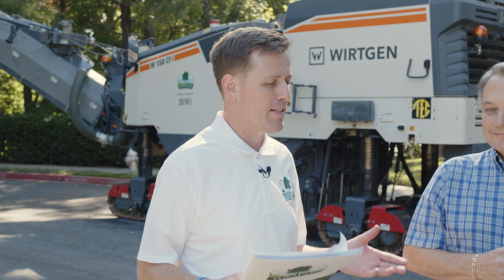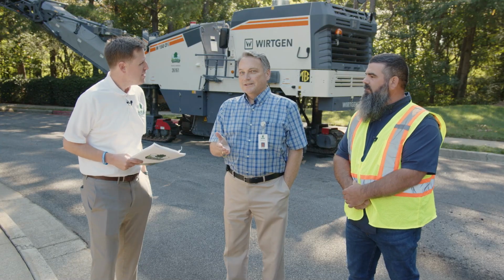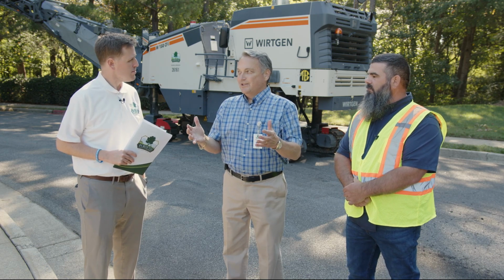So how long do these projects typically take, guys? I mean, I'm sure it depends, but how long in a typical residential project? Typically the way it works is once we've developed their list and we've locked it down, like for 2025, we'll give it to Roads and Bridges, they'll verify it, and then once they finish, they're still working on the 2024 deep patching ahead of our contractor. They have to get ahead of them about 25, 30 miles ahead before he shows up in town to stay ahead. So they will not stop. They'll just start over on the 2025 list and go ahead and try to get it finished before we let that resurfacing next year. So it could be from the time the Roads and Bridges comes in and does deep patching till the time it's resurfaced, it could be 6 months.